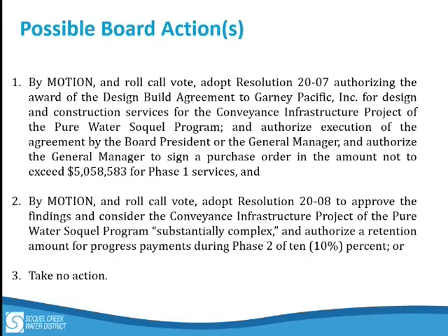And, you know, some tasks were a little higher, some tasks were a little lower. But at the bottom line, we came up with a very comparable price between the two design efforts. And that makes us feel confident that it's a fair effort. It comes down to well over 10,000 hours worth of work. And so it's not just one or two people working on this between now and October.